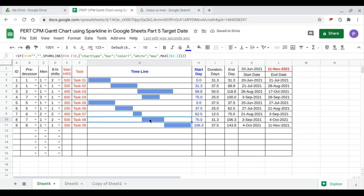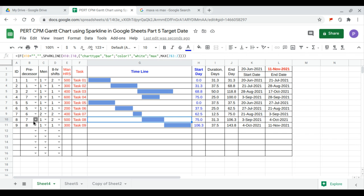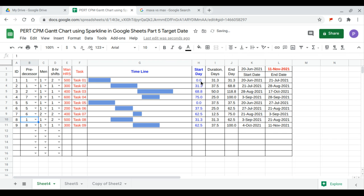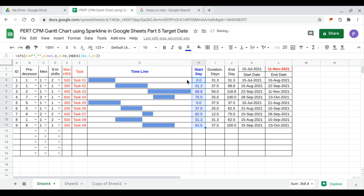I want task 8 to follow task 1. So task 8's predecessor is changed to task 1, and we update accordingly.